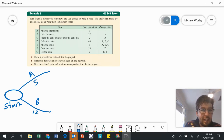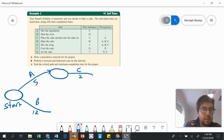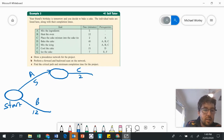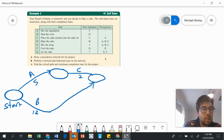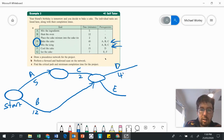C happens after A, so we've got C happening after A. C happens after A and that takes two minutes. Notice that I've put the letter and then the number on the link. Now D happens after A, B and C. And so does E. So this here is going to have to link up — that's B, 12 — and then D happens. A, B and C are the prerequisites for both D and E, so D and E are both going to branch off of here.